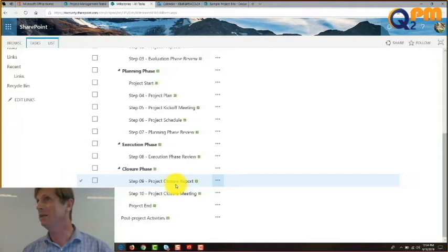This has an amazing effect on projects. I've done this so many times now, where if you can get all the sponsors in the room nodding their head, yeah, you gave me everything you promised you'd give me. Yeah, we're all done. They don't come back. They think it's done. They stop calling. They come back later when they want more, but they want it as another project. They don't think you forgot something.